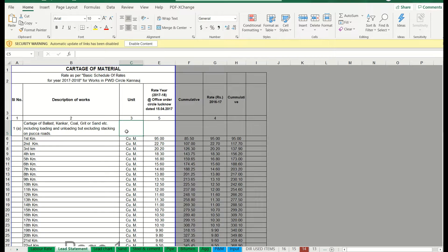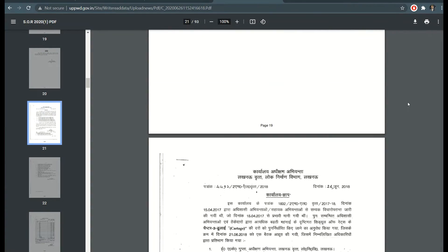First, to start with rate analysis, you have to get the SOR — nothing but Schedule of Rates — from the consent department, PWD department. If you are in UP, you have to collect it from there, or Andhra Pradesh or Telangana — from whatever nearby district PWD headquarters. You have to go collect the Schedule of Rates, or you can download it if it is available.